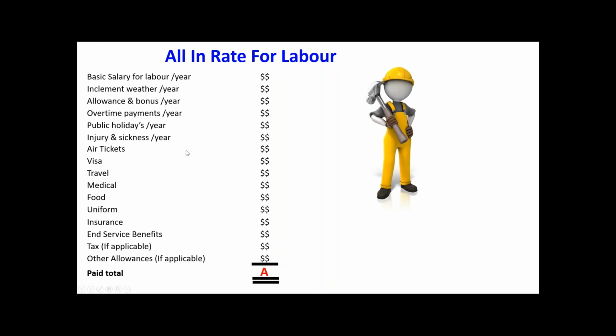Now, based on your project, your location, your place where you practice now, part of this may not be applicable. For example, talk about countries like India, Sri Lanka, Pakistan, or Philippines. We have so many countries. These are people working from their own country. You don't need to give the air ticket or visa, isn't it? So no need to price it like that. Depending on your location, you don't need to include it.